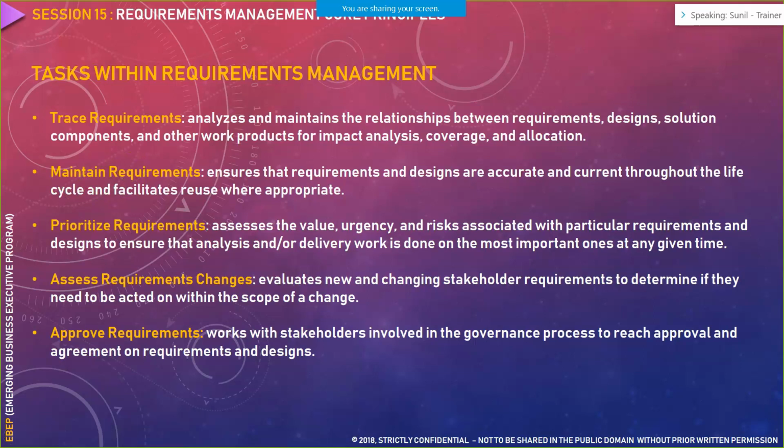Next it talks about prioritizing the requirement. As we already know, we did so many exercises on prioritizing, like how we go about ranking a requirement, or how we do a MoSCoW analysis around must have, should have, could have features. It's very important for us to keep our requirements prioritized. Like, this particular sprint is ending next week, so we have to plan our sprint during this week itself, about what the development team would do after they have delivered that sprint.